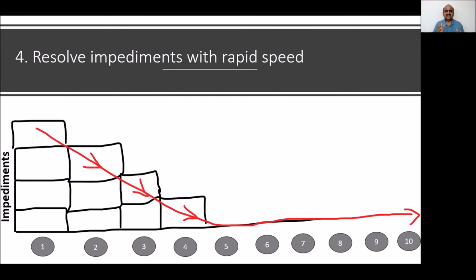What are we doing? We are just working with 100% focus. We're trying to see whether the impediment can be solved with all possible options. And what if you can't solve an impediment? Assign that impediment to the person who can do that. Don't keep an impediment with you for more than a day when you can't solve it. Simple. If you can't solve it, assign it to somebody who can. At least do that. But don't keep it as an impediment on your name and not solve it. If you are not solving it, you're doing an injustice.